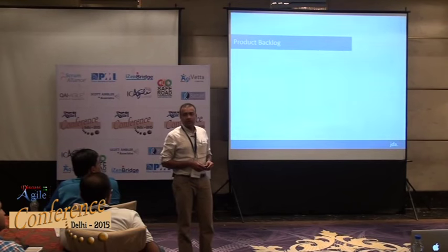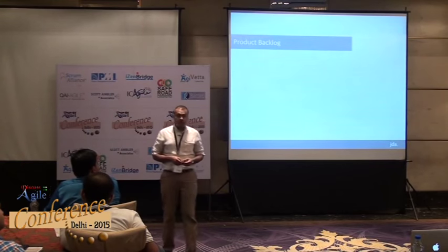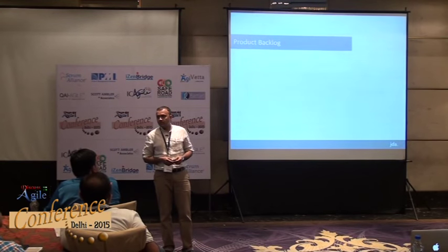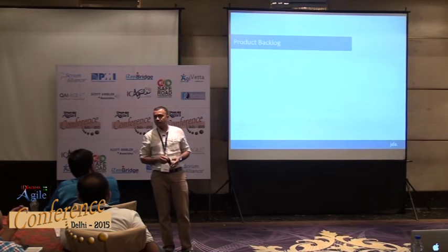That's important. Previously, it used to be we have to add 3 buttons and all that. Now we say that as a salesperson, I would like to, so that helps the technical people know what they're actually adding to the business, the value add. Good point. Having the context gives you an idea of how it should be designed, how much performance you should be targeting, what kind of quality there should be. You get non-functional requirements.